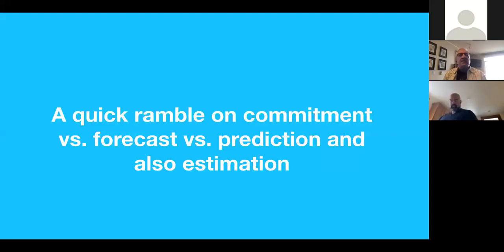Anyway, that turned out not to be good because it started to bring back old dysfunctional waterfall behaviors, like people would be up late the last 2 nights before the end of the sprint to try to get stuff done. People would start to do bad behaviors about sandbagging on estimates and picking and choosing stories so that they would make their commitment rather than worrying more about what was the best thing for them to build and develop for the product and for the customer.